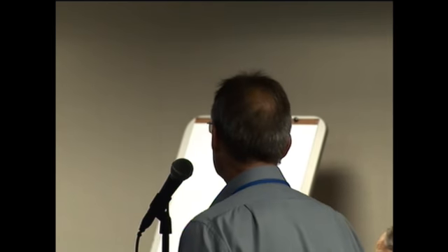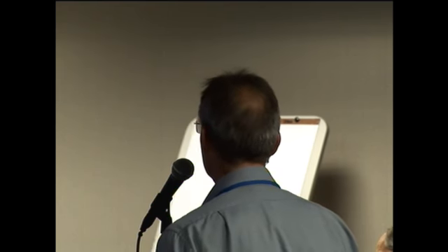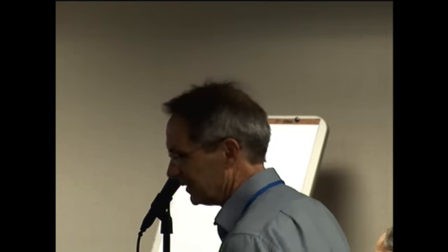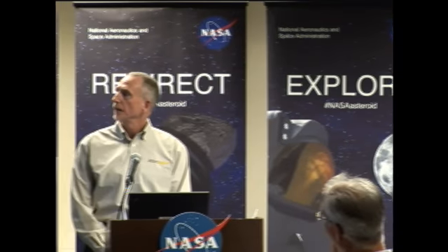I thought that was very cool, but I was a little surprised at the end by your recommendation for doing this as a proto-flight. What was driving you to that recommendation? Well, it's certainly reduced cost and schedule, and so that was probably the primary reason we put that in there. It's certainly not necessary. If there's sufficient time and money in the program, we could build a dedicated flight unit, if that's what the program wanted to do.